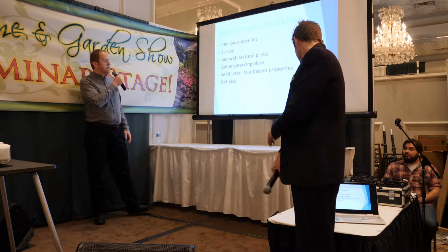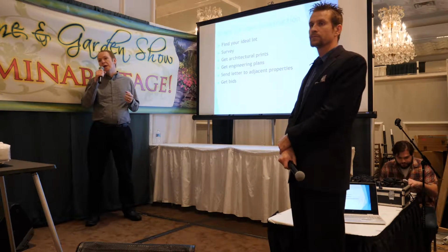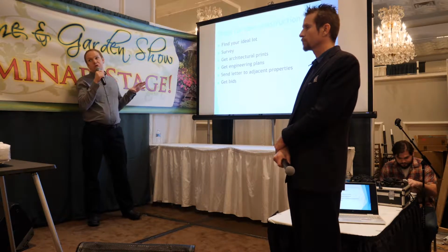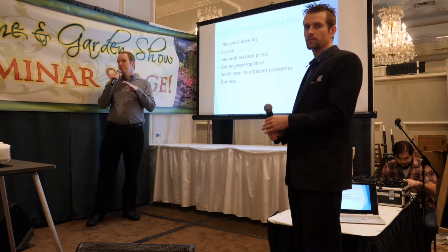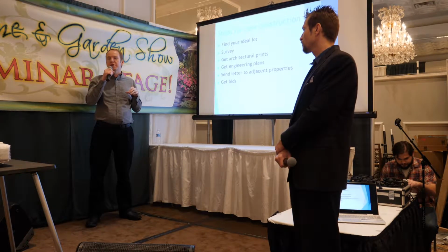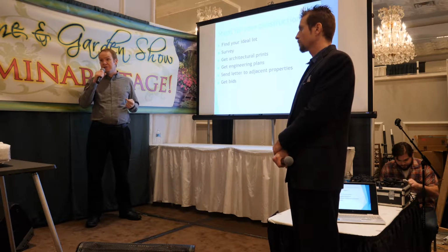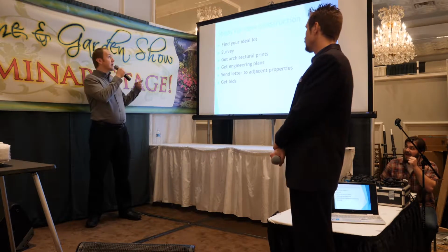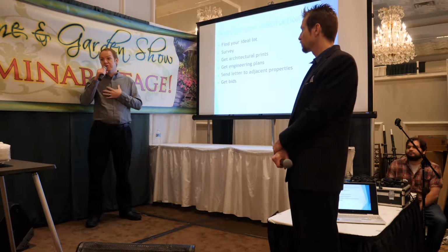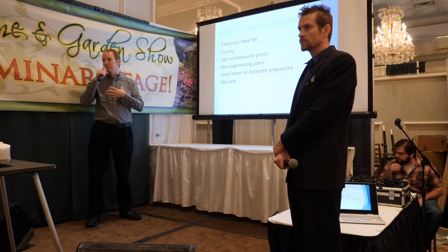So once you've got your lot picked out, obviously you want to get a survey, and then that survey will help the architect and the engineer design everything that's needed for the house, the layout, the setbacks, and all that stuff. So you want to make sure your architect checks for the setbacks and that your engineer checks for the setbacks. We had a client that hired us just for the construction. We weren't involved in the planning phase. They just hired us for that.